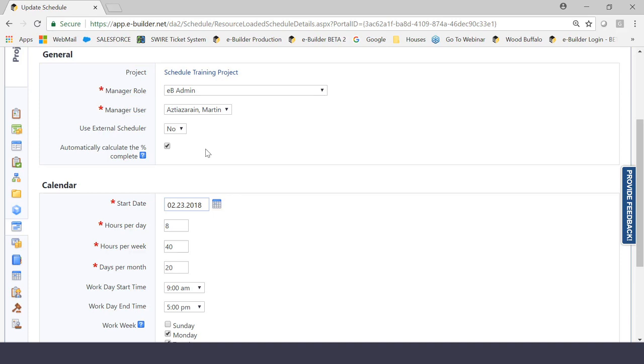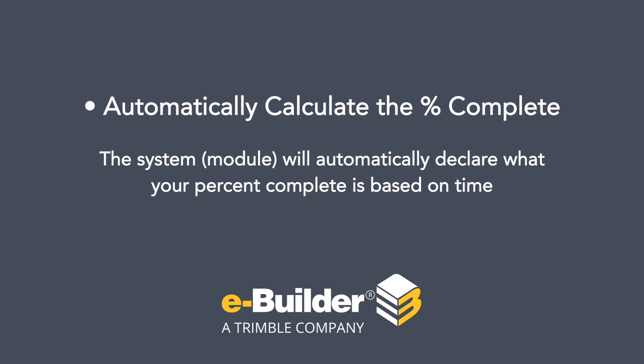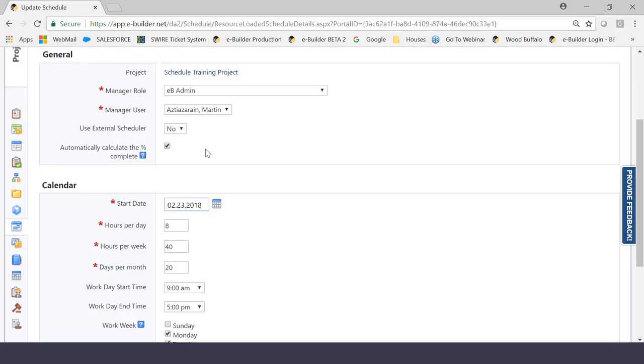So if you do check this off, the system will automatically declare what your percent complete is based on time. But if you have it unclicked, the system will allow you to manually determine what your percent complete is without it automatically calculating it for you based on time. So I would probably argue that the most popular choice here would be to uncheck this, but again, being aware of what it does is important.